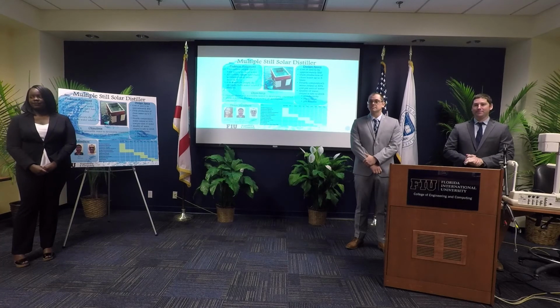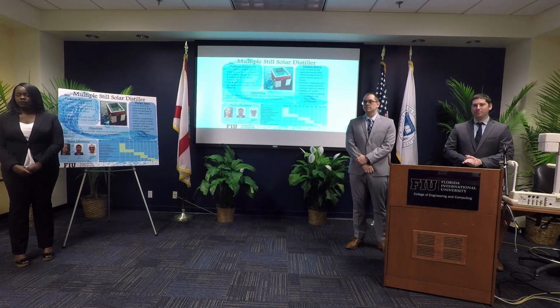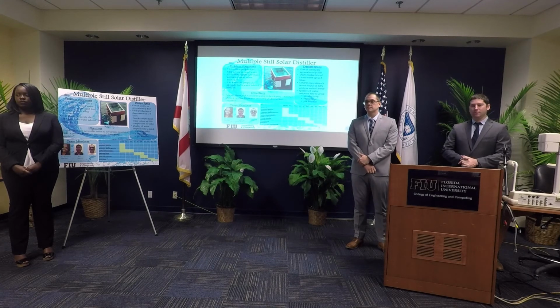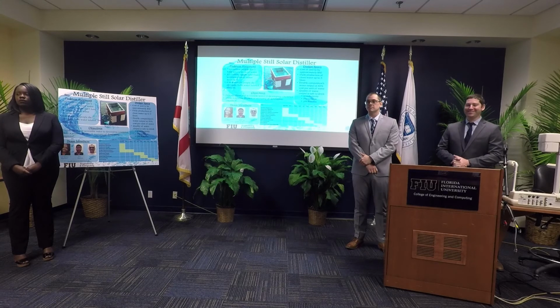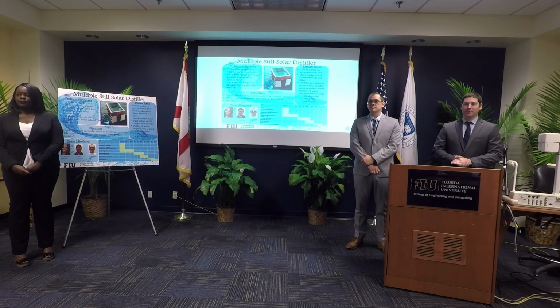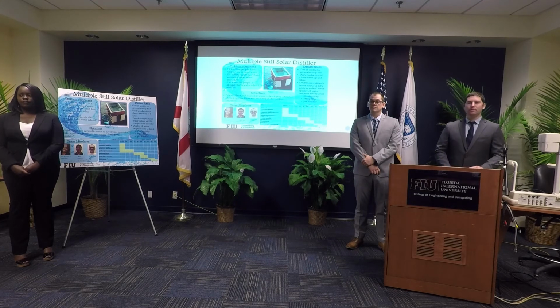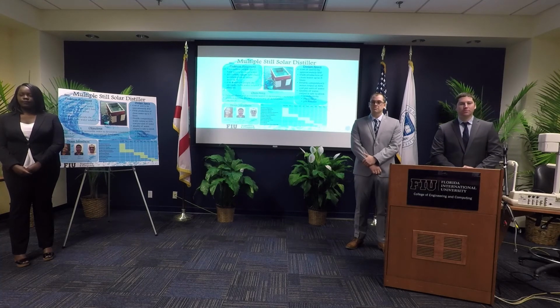I'd only make one comment. Your building of your prototype probably should be moved back a little bit to give yourself some time to fail and figure out something else to fix it. Right now, if you're doing it in November and December, and we're back here December 15th, and you're still messing around with your prototype, you might be better off moving that back and giving yourself some time. Yes, sir, absolutely.